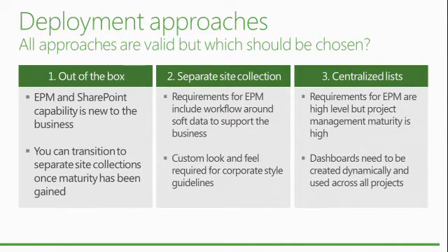If you use the option 1 scenario, everything's under the Project Web Access. You can, if you want, use site content types, but then you can't start adding workflows to it because you can't connect SharePoint Designer to it, so you have to use code. But you could still do that standardized approach. And the same rules apply for number 2, essentially. So you could have sites underneath sites. If you put the content types at the top level, they will be available anywhere in the tree.